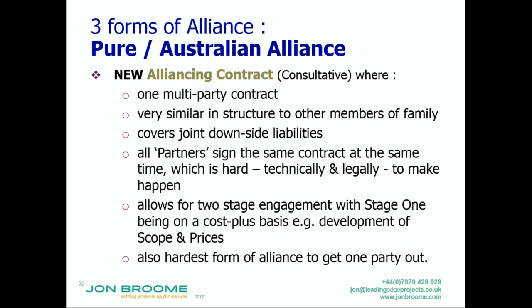All partners sign the same contract at the same time. And this is the hard bit, because if you're going round the houses with a contract to legal departments, everyone wants to make a change, and then it's got to do the circuit again for everybody to be happy. And technically, in terms of the scope for everybody, you're doing this bit, has to be there at the same time. So I do know alliances which have been entered into, but actually no one signed the contract,